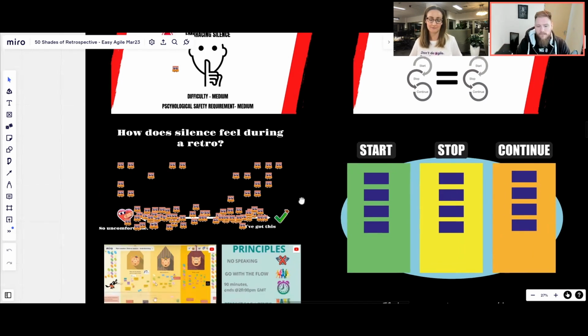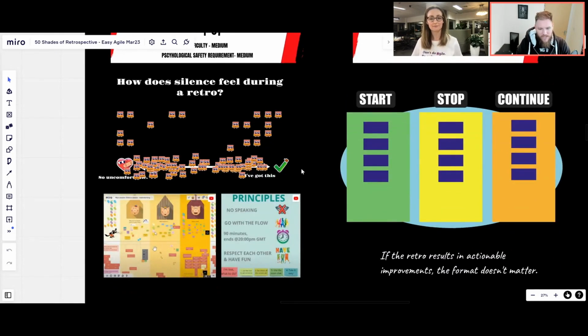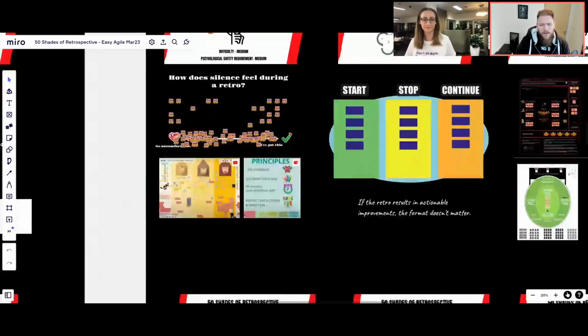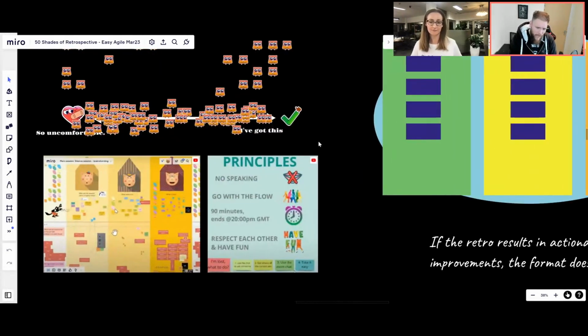And if you are feeling very brave, what you can do is try a completely silent retrospective. Have I gone? Yeah, I've gone to facilitation styles. So a completely silent retrospective, the way that works is no one speaks. It was introduced to me by a gent called Dov Sal. And if you want to learn a bit more about it in detail, you can click on this space here. There's a YouTube video. Dov and I explore how it works. But essentially, all you need is a virtual whiteboard, a bit like this, some clear principles, i.e. no one speaks, and then just go with it.